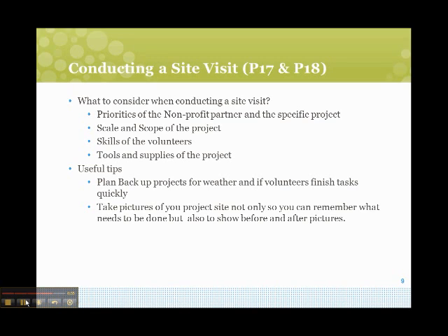Backup projects will be used in case of rain or if volunteers finish other tasks quickly. It is important to have a good number of backup projects so that volunteers always have work to do. There is nothing worse than being a volunteer and feeling useless when you run out of tasks or there's not enough projects prepared. If you remember to prepare, and plan for everything, you'll be all set.